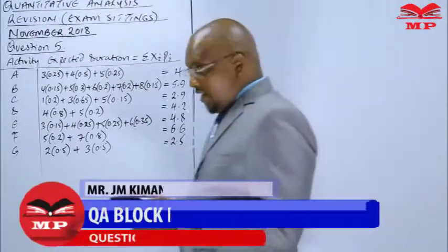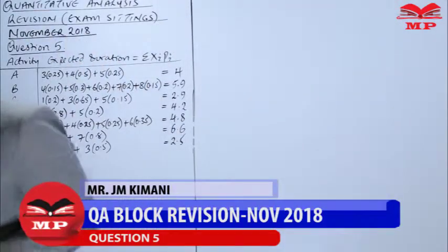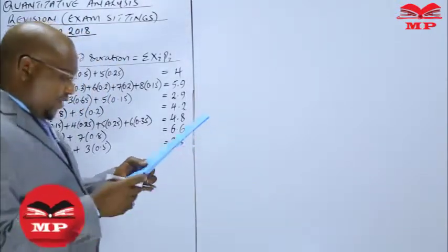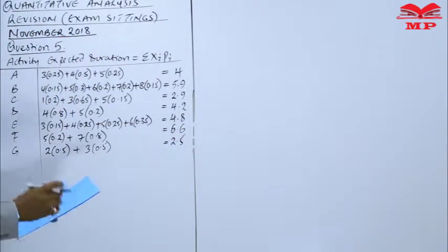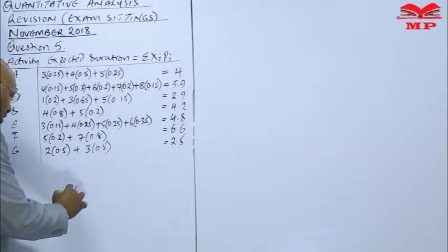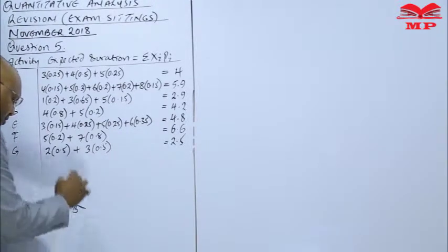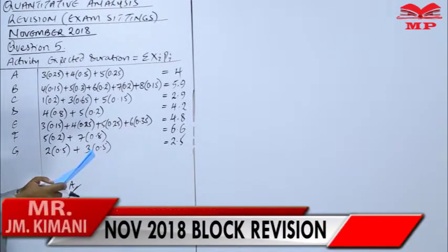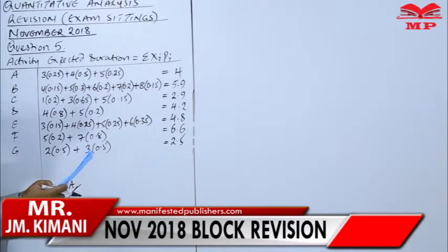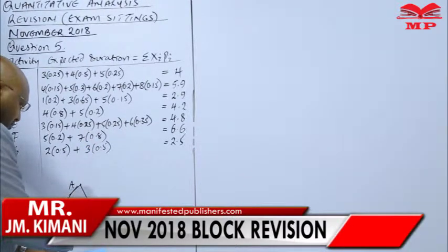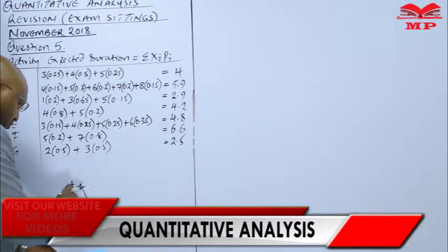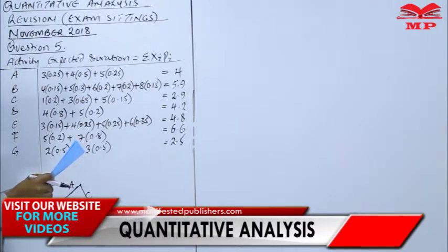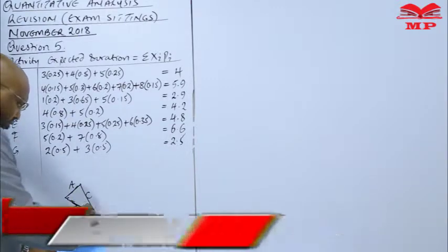So with that now we have the duration that we can proceed to the diagram. Roman 1, when you are asked now network diagram, let's have a sketch here. So A and B are the ones starting the project. This is A, this is B. Then we have activity C coming from A, meeting with B, that is to give us D.